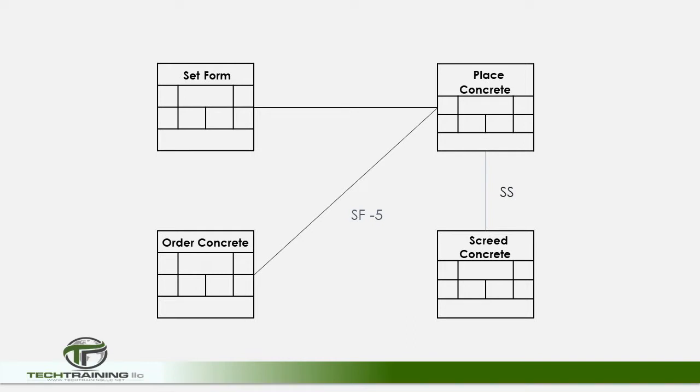Again, the forms have to be completed before the concrete can be placed, while the ordering of the concrete and the placing of the concrete is a start to finish with a 5-day delay. In other words, ordering the concrete must be done 5 days in advance of placing the concrete.